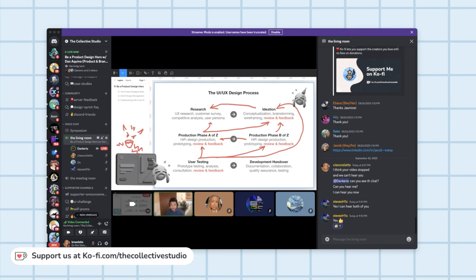So the thing is that this is the reason why we should put milestones in between and all throughout the design process. We should put different milestones so that we can make sure that the draft or the prototype, the final prototype that we will be creating, are actually up to par with our objectives and our standards, so that we don't really need to loop back or to go back that much. But yeah, this is how things are done. Usually, I'm not saying this is how things are done in all companies, but usually this is how things are done, especially in terms of UI UX design.